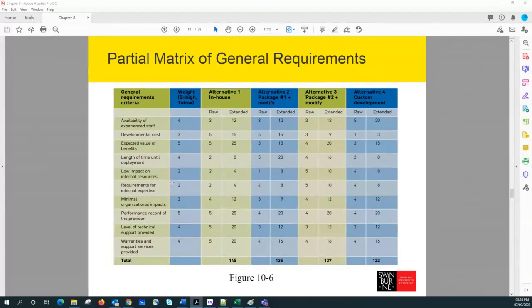So what we can do is give a kind of weighting for each of these general requirements. Maybe we can take a 5-point scale, right? We'll give a higher scale value for the most important items, and a lower scale value for the least important items. It depends on the system you are developing. Now this scale, or this weighting, has to be done by yourself in a logical way. You need to discuss it with your team members, okay?